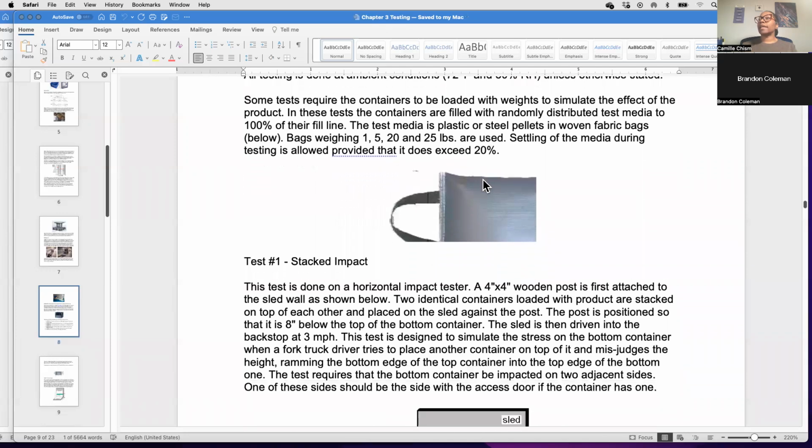Okay, we mentioned the weights, and I mentioned that came in because with the weights, if you don't have prototype parts, if you don't have production intent parts, but you know that you have, I don't know, a 6-month lead time on getting your racks or getting tooling in for an injection molded pack, or for some dunnage. If you can't meet that lead time, you have to know what the lead times are in general for your packaging. And if you can't get parts and tested in time, then waiting is an option.